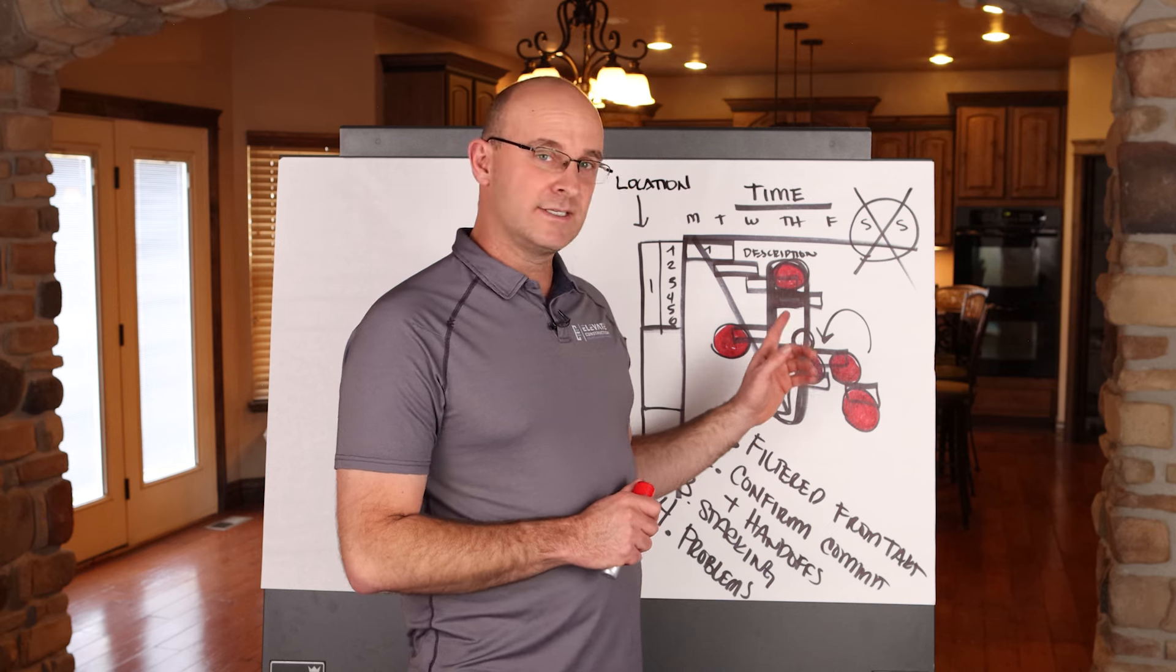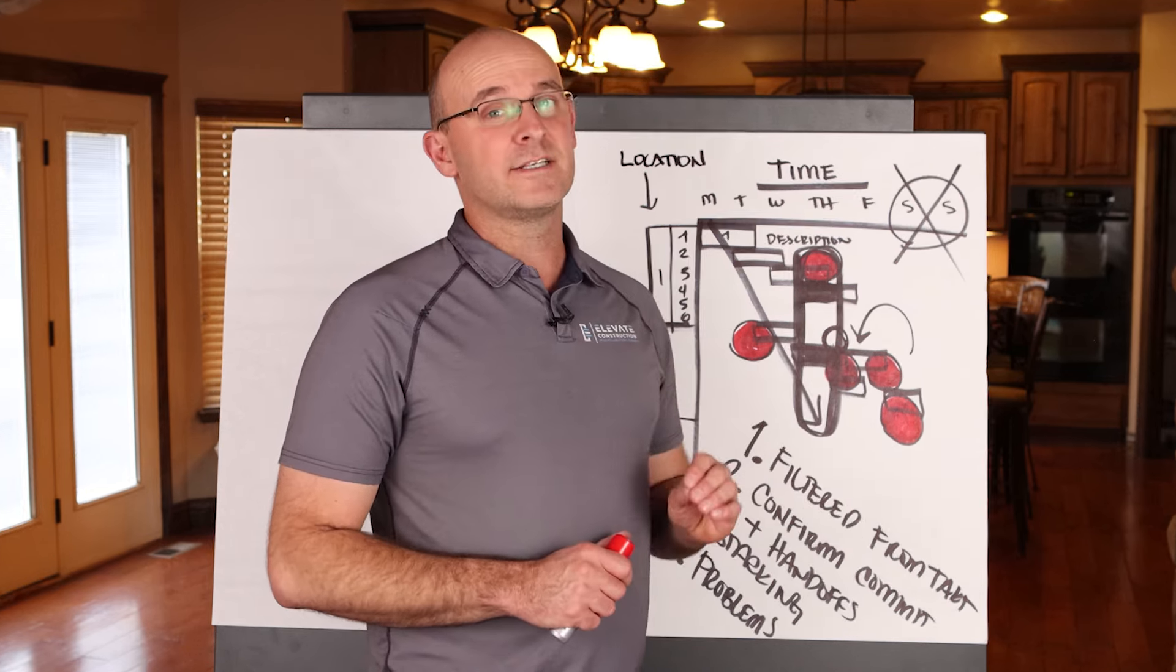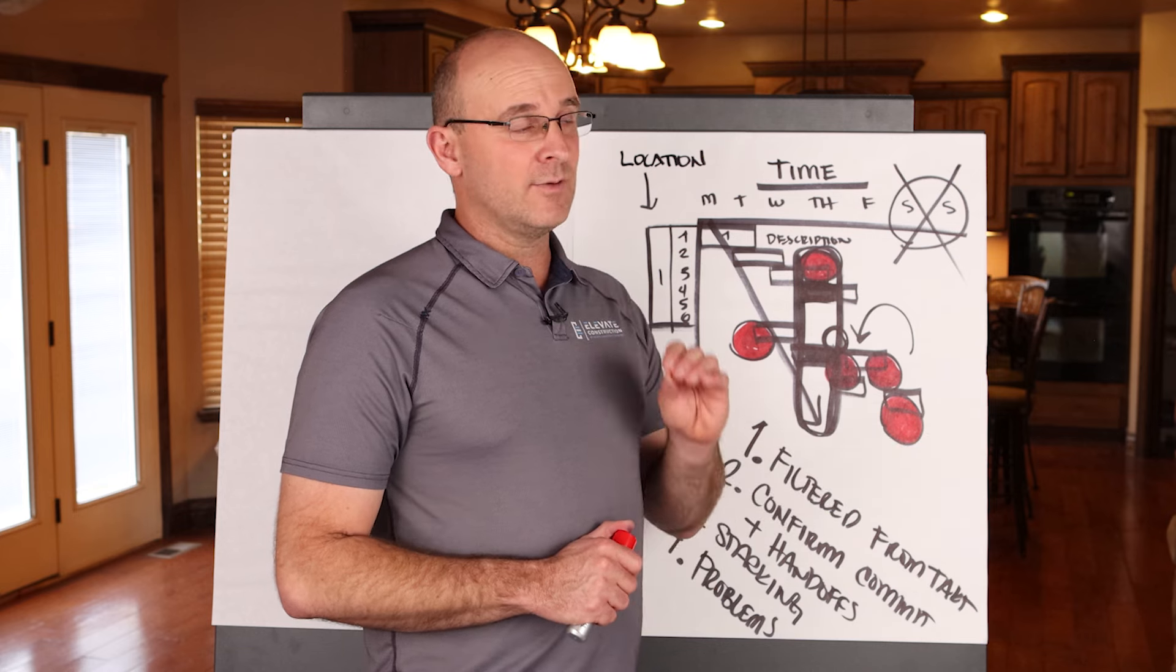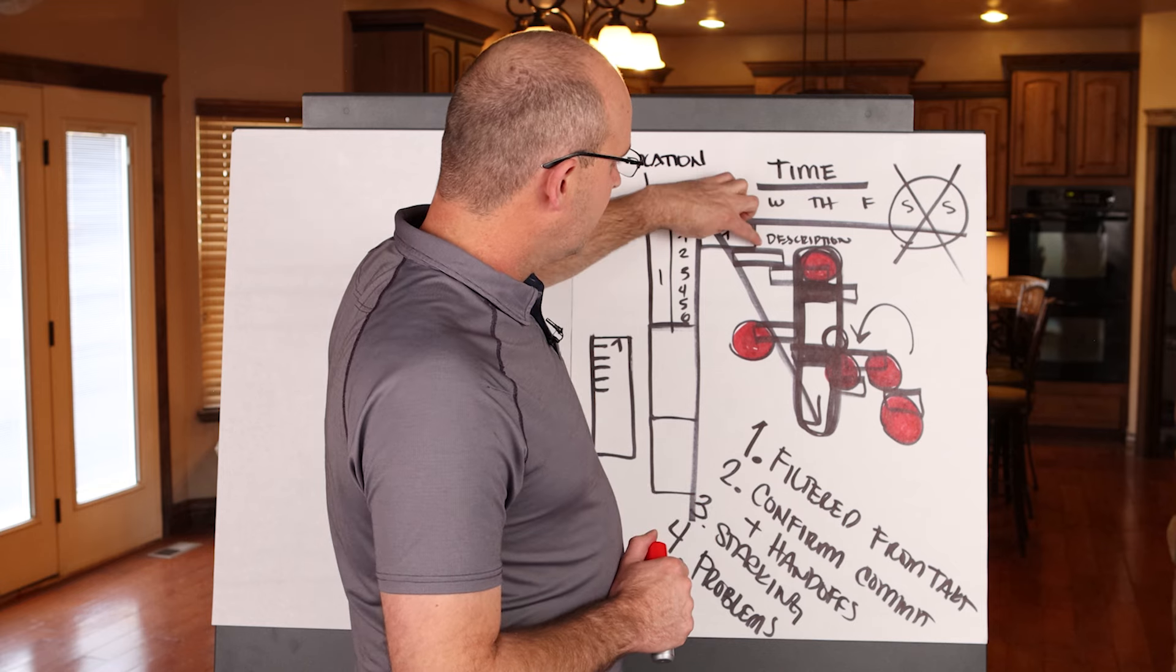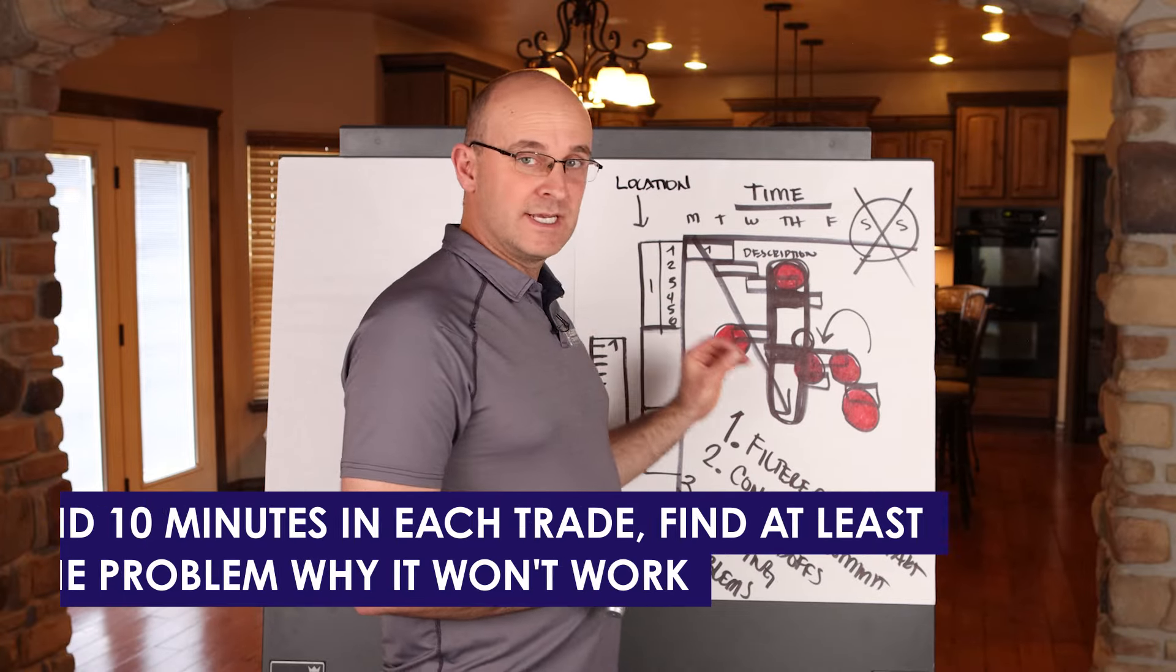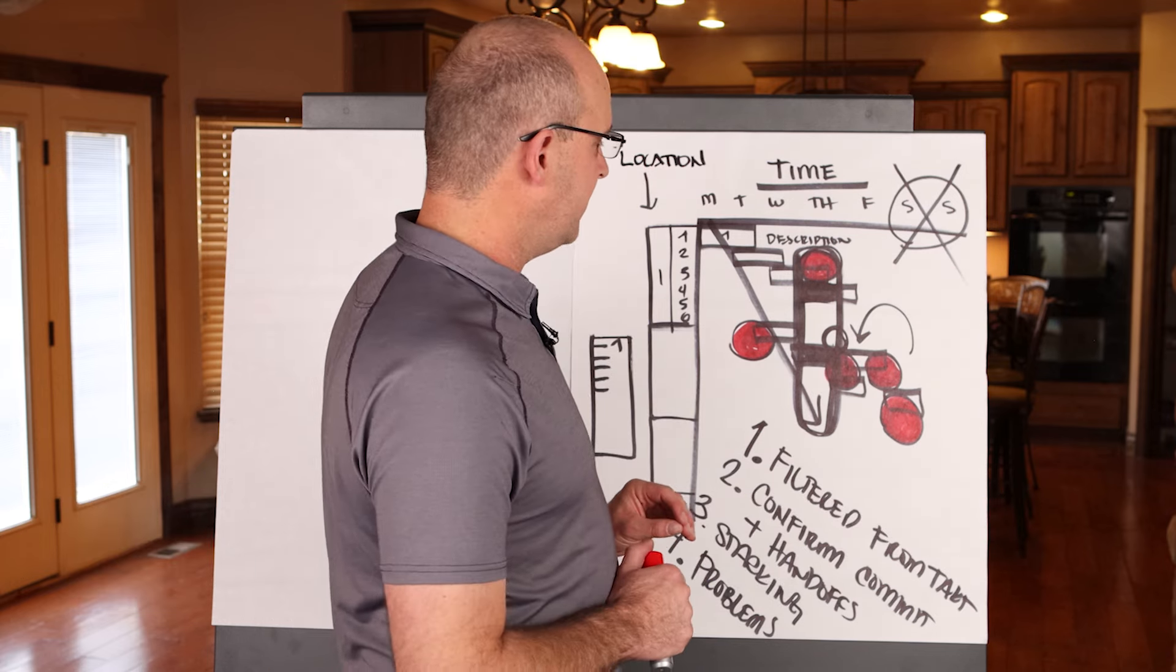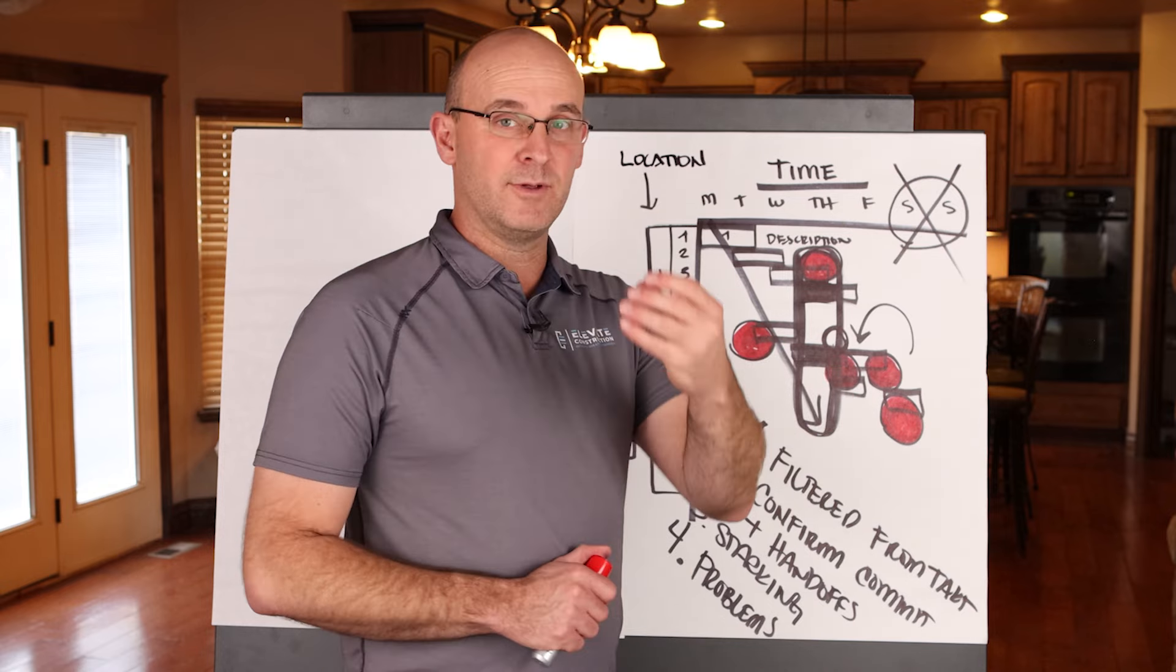Now, if you're looking at this and saying, hey, Jason, I don't think my foreman would ever bring up these problems. Try this little trick. Set a timer for 10 minutes in your trade partner weekly tactical with your trades or in whatever engagement you have and say, I want everybody once we've populated the plan, once we have coordinated handoffs and commitments, once we've analyzed for stacking, I want you to spend 10 minutes and each trade find at least one problem why this won't work. I've usually found that that really does do the trick and gets people to speak up because you're trying to find these problems so that they can be solved and create a commitment for the next week.